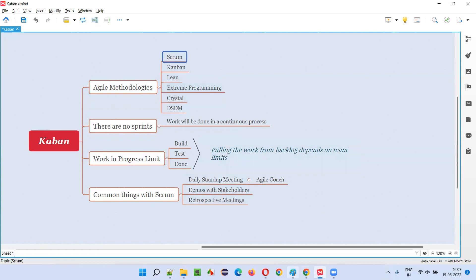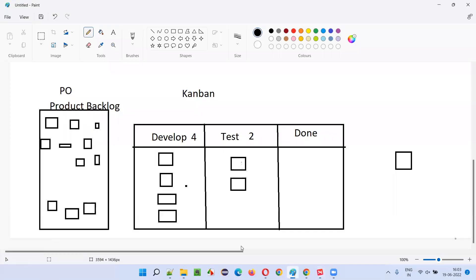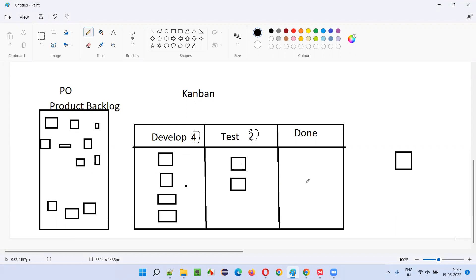So you understood what Kanban is at a high level. There is no particular time limit, and work-in-progress limits apply. Two developers means four items can be done at a time. If more than four won't be assigned — if any vacancy comes, then only we pull more. Work is completed in a continuous way: after one item goes off, another comes in based on priorities.